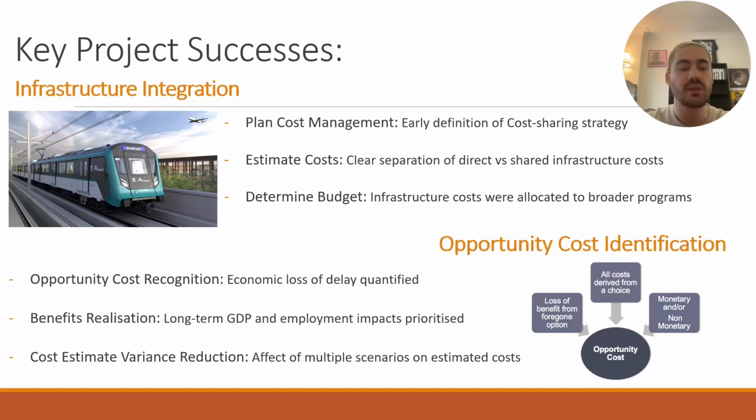While those for opportunity cost identification are recognition of opportunity cost, where the actual economic impact of delay was quantified; realization of benefits, where the larger role of the project accounted for long-term impacts; and reduction of cost estimate variance, whereby identifying multiple possible delay scenarios allowed for different estimated costs.